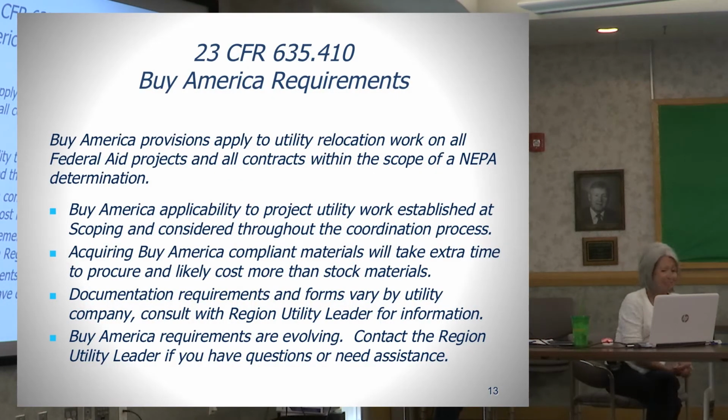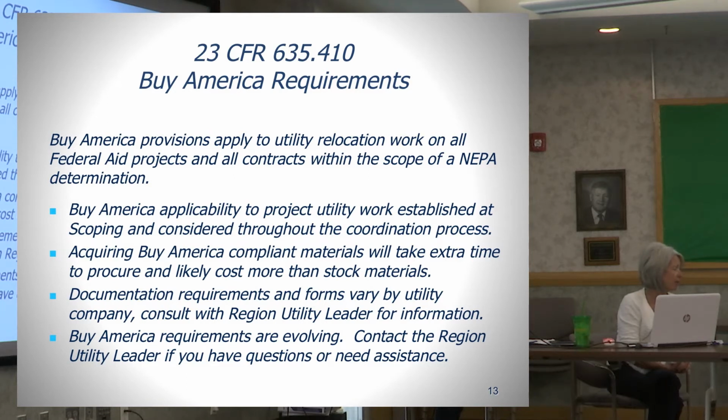As you're aware, anytime you have a construction project that is subject to Buy America, all of the utility contracts and relocations on that project are also subject to Buy America. Specifically related to utility work, it's important that the utility companies are also aware of Buy America and the requirements, that they know from the very beginning of the planning process that it is a Buy America project.